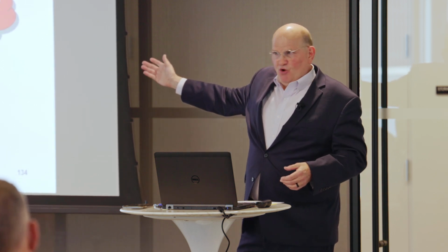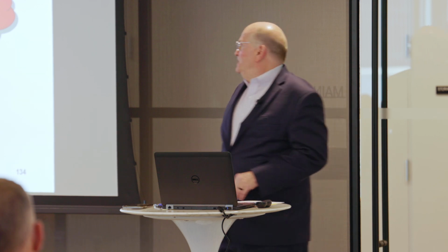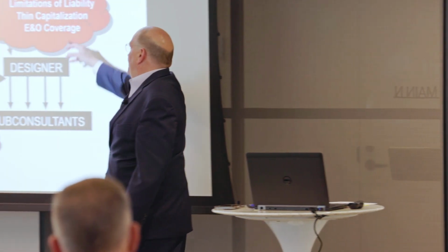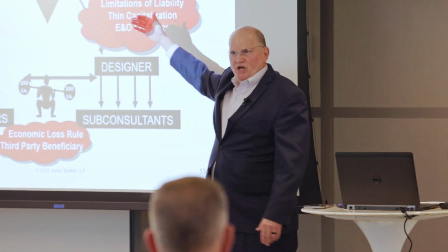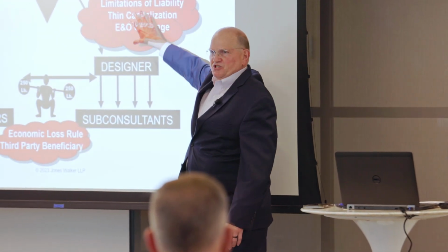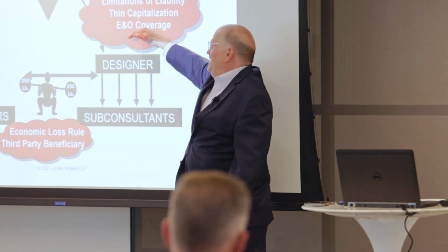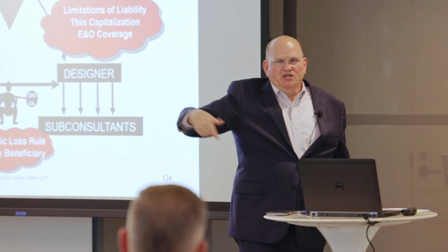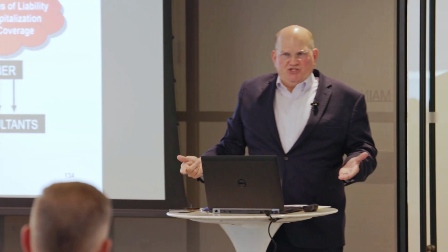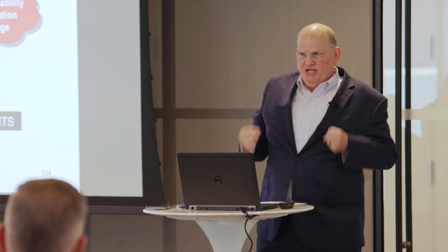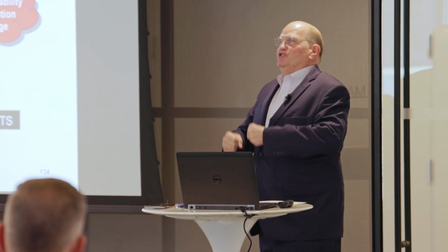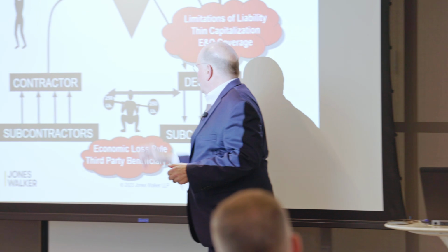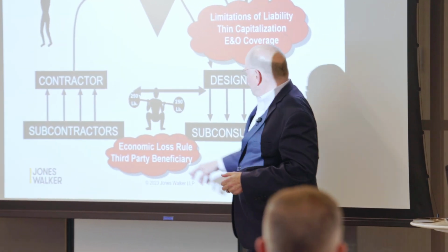So if you don't have the insurance, you're going to be in serious trouble unless you want to take their cars and their homes and things like that. And we already talked about how E&O coverage, from a practical standpoint, a financial standpoint, is the major protection. You still have to establish that there was a breach of the professional standard of care in order to trigger coverage in any E&O policy. Now down here, there I got the arrow, but I screwed up its location.